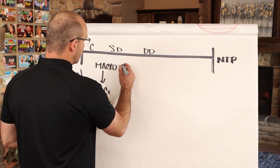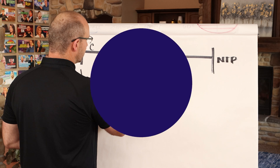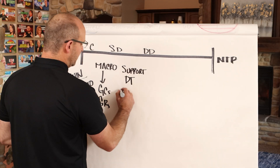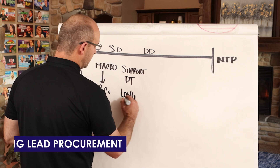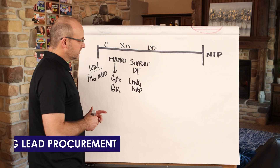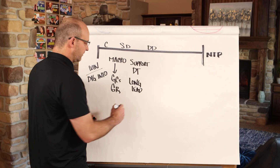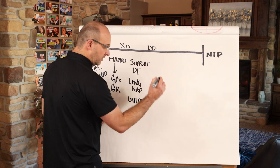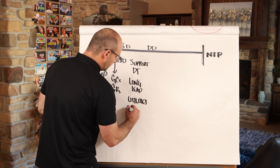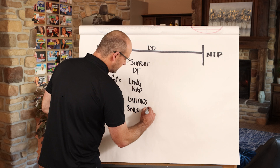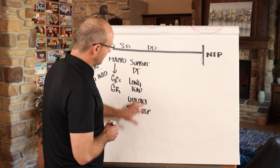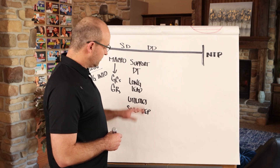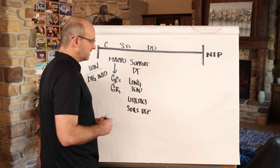In late schematic design, you'll want to make sure you're supporting the design team and focusing on your long-lead procurement. You're also looking at things like utilities for the plot of land you're building on, and reviewing the soils report to make sure you don't need shoring. Any long-lead, big-ticket items that need to be addressed — this is the phase to dig into them.